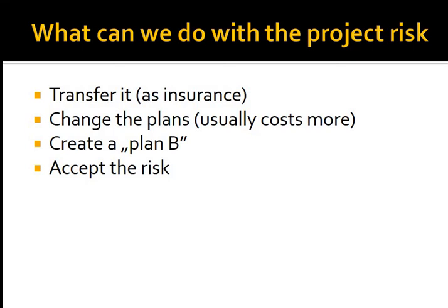Well, accepting the risk means that we may be able to pay a little bit more, or we might be ready to delay our project if those risky factors come into play and the risk just materializes.